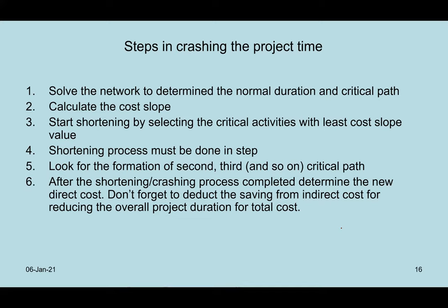You see the application. Now, step number one, solve the network. When we say solve the network, you can use an AOA diagram or AON or even a PDM diagram, because what we need is just solving the network first. By now you should be able to solve the network diagram using whatever method. Perhaps some of you have already done assignment number 2. Assignment number two is all about planning and scheduling. By now, you should be able to solve any network diagram, and then calculate early start, early finish, late start, late finish, total float, etc. Because we are going to use that inside this concept to determine the normal duration, critical path, etc. Now we have already completed that.